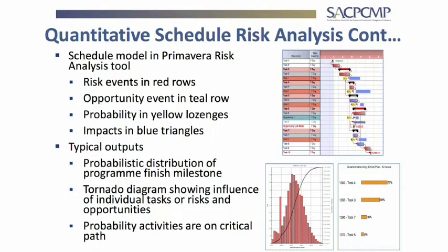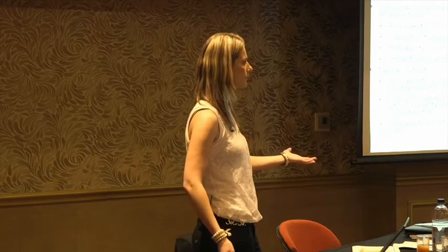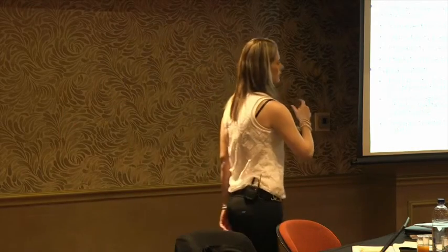It's garbage in, garbage out — the accuracy depends on how well the schedule was built and how realistic your risk workshop was, including likelihood and impact estimates. At the bottom you get a histogram distribution. You can ask for a P50 or P70 on schedule: if there's a 70% chance of overrunning, when will you finish? The output is a date, not a monetary value — for example, you'll finish August 2016 instead of December 2015.